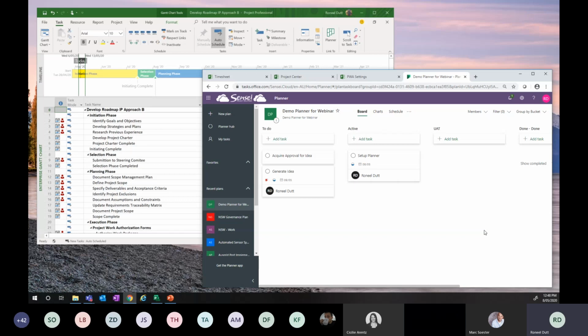And what that'll do is it'll enable you to make sure that when there's a public holiday in New South Wales, that renewal's not reflected in the plan. And therefore your resource plan, piping all the way from all the various teams, starts giving a more realistic picture of availability and therefore driving demand.